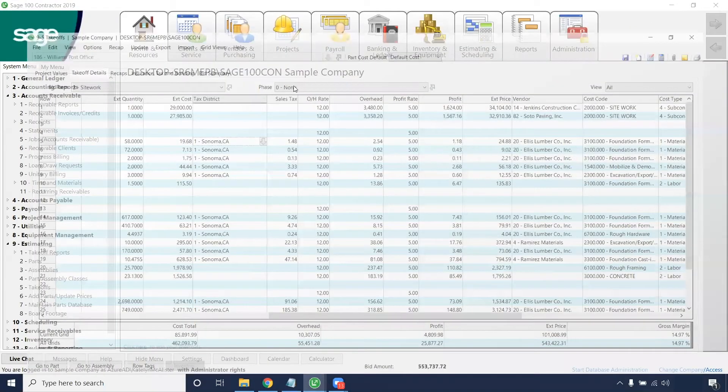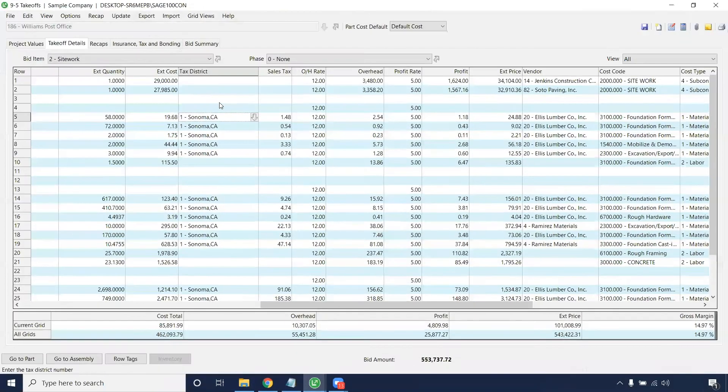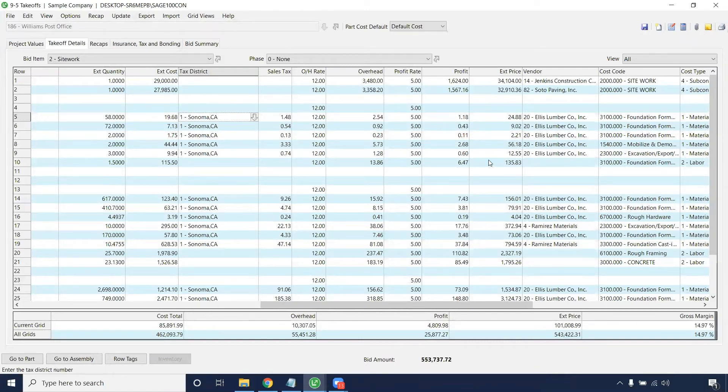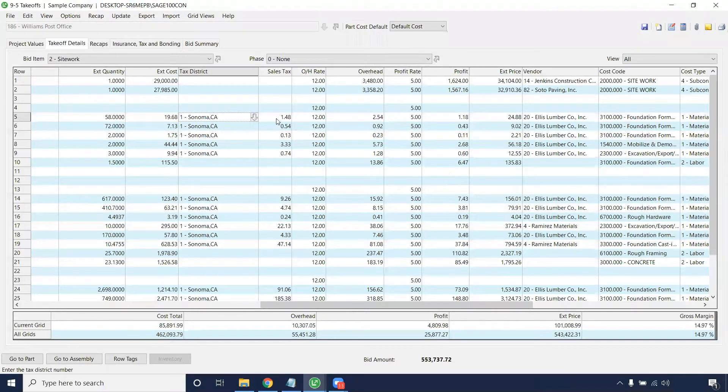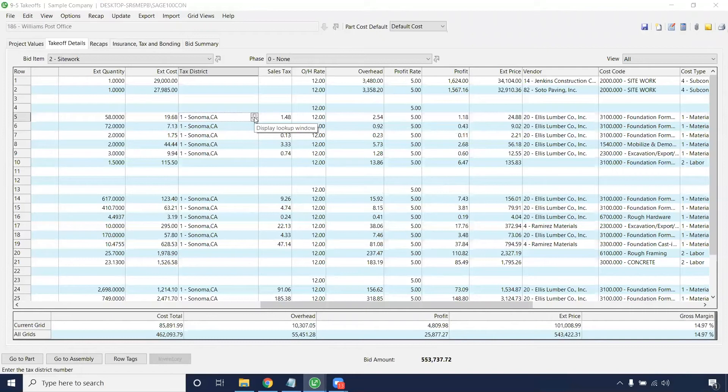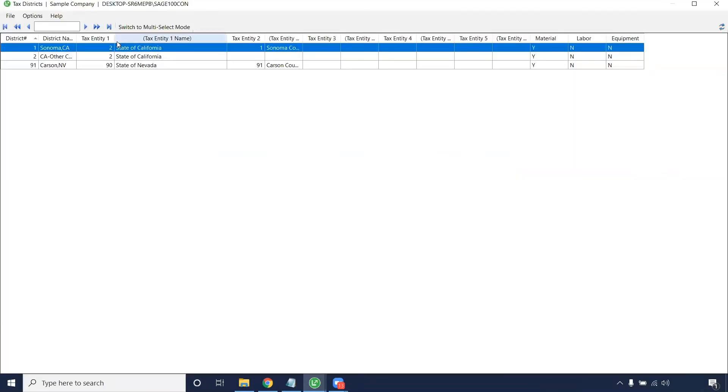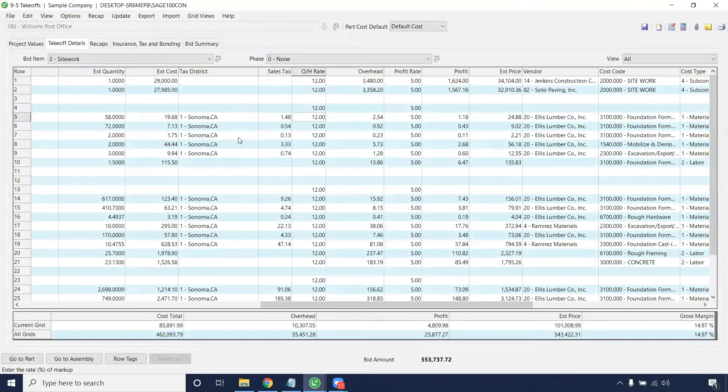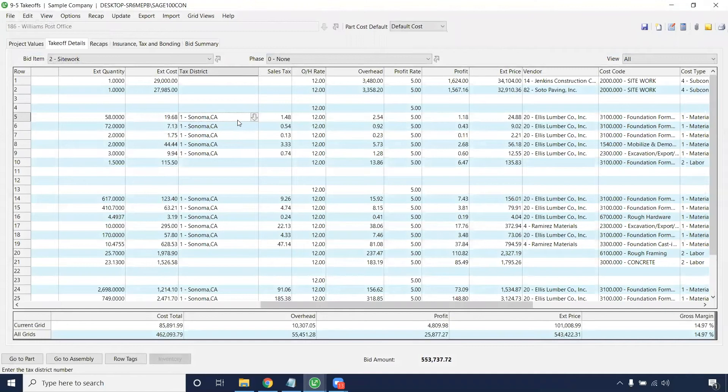To add this on the takeoff, in the sales tax district, you'll want to put this on all material items. Note that most times labor is not taxed. Of course, that would be specific to your company. On material items, you'll want to select the tax district that relates to that item for the job, and then hit the calculate button.